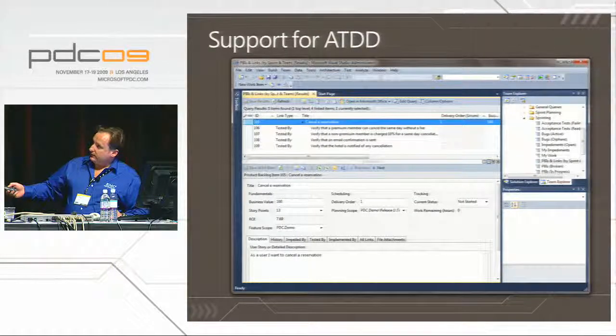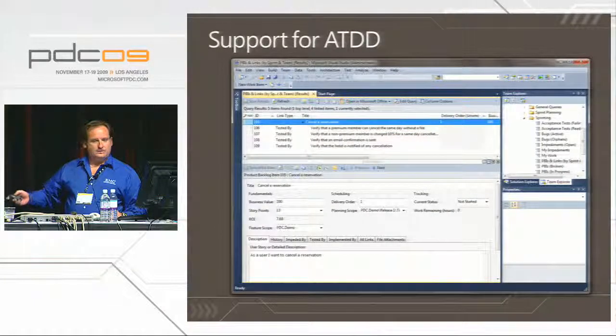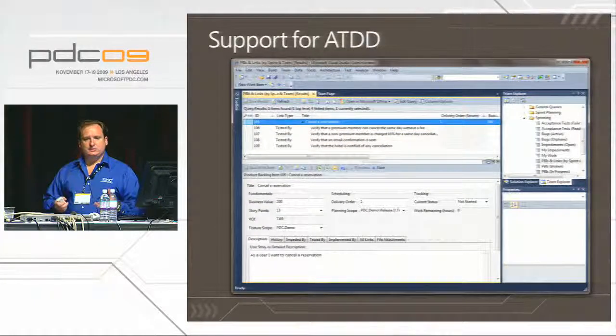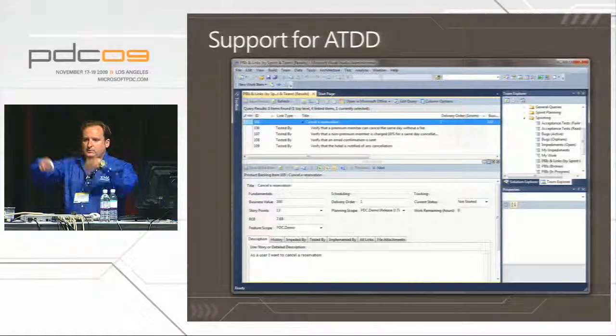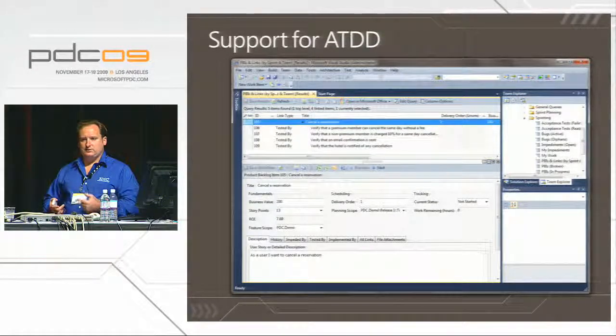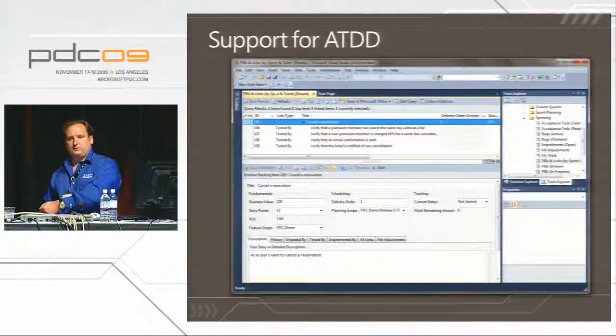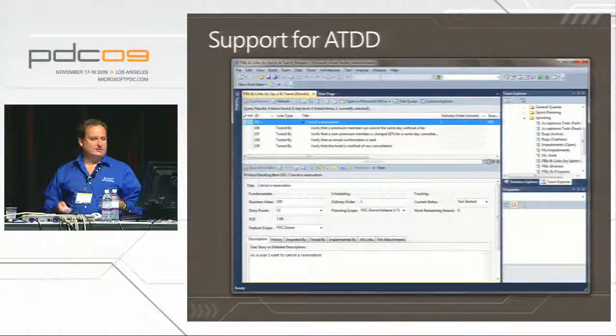And then directly connected to it, because this is a tree query in WCL, or the work item query language, you can see that all the acceptance tests are directly linked to it. So this is the sort of thing that your business owners can actually relate to. Before, they would actually look at sprint tasks, and sprint tasks are meant to be understood by developers. That's the whole point. And you get people turning themselves into circles trying to make sprint tasks that were readable by the business, and then they didn't serve the developers anymore, and you have this whole status problem.